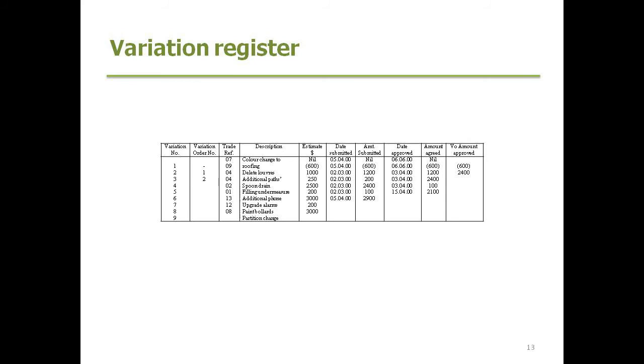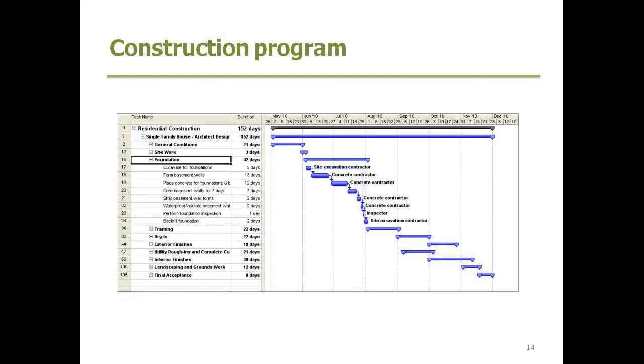Maybe a trade reference number there. There could be a number of different other items, which means that in the final summary, when you present the adjustments, it relates to either a trade, a cost element, or it may be a particular subcontract or a provisional sum too. So any other references that assist in these, including making it clear what the estimates were for yourself, the submission dates, variation number, and agreed VO number in there as well.